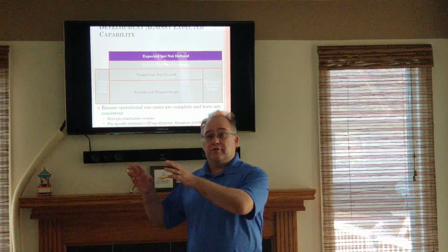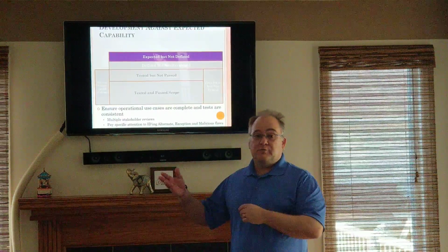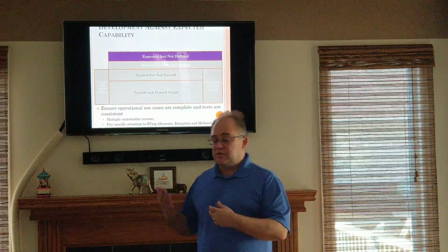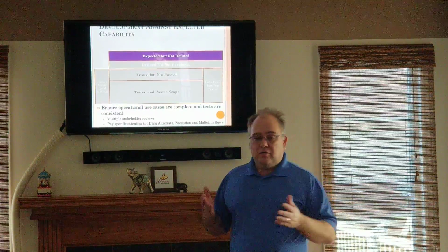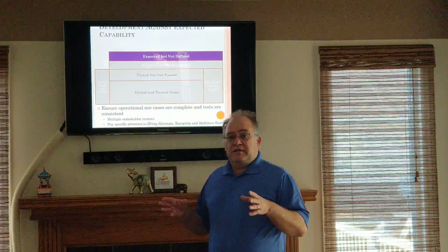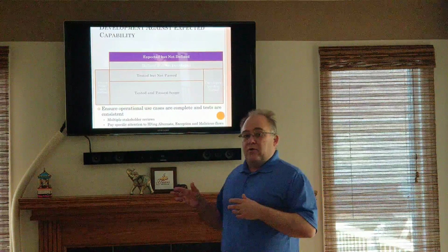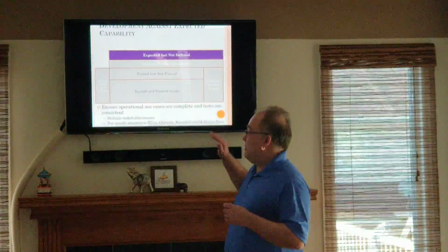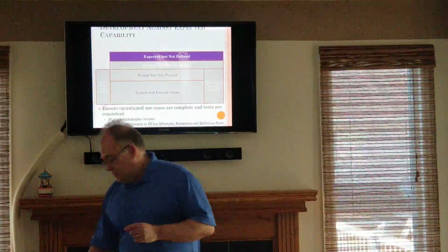So their responsibilities have changed, perhaps their pay has changed, but it's not actually a promotion, so you can't process the promotion through the system. All these sorts of edge cases, they missed them. And fundamentally, when they tried to implement it, they implemented it in a manner where it was difficult to add them in later. And that's because they did not spend time on the operational use cases.